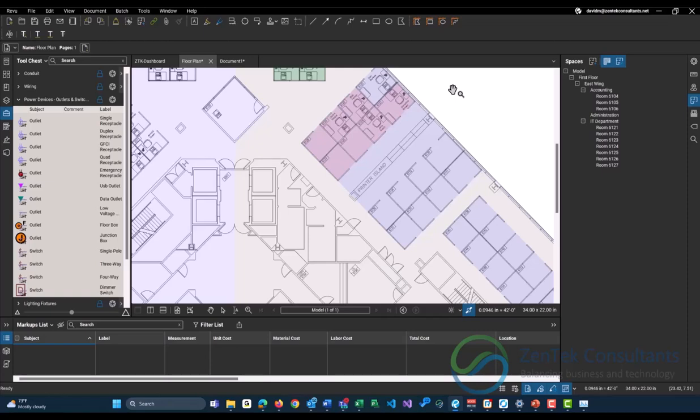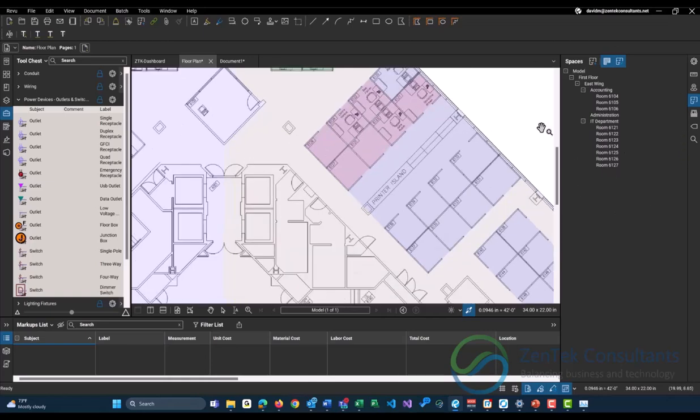We always recommend doing it either by groups of areas, like a department, or for any of you construction folks out there, if you're breaking up a project into, let's say, phase 1, phase 2, phase 3, and you want to know how many of what type of object to order per phase, Spaces can allow you to do that without breaking out your estimate even farther.